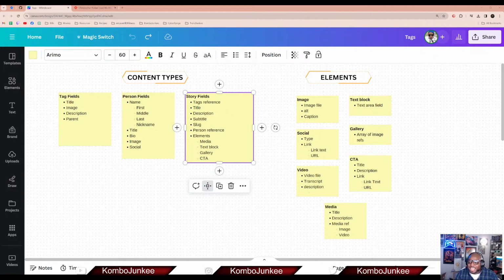Okay, so in order to properly manage the work in a sprint, you need something called tickets. Tickets sounds weird, but that's how the development world manages work. Everything is in the form of a ticket. And a ticket is a task that details specific work to be done by a specific person on a specific team. Throughout your time on a given team, the product owner will receive requests from partners and stakeholders, and they'll eventually convert those requests to tickets that live in a place called the product backlog.